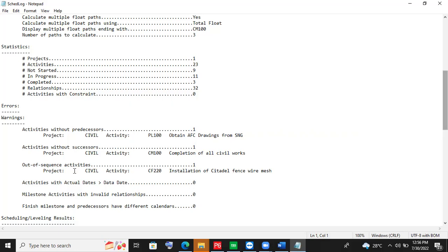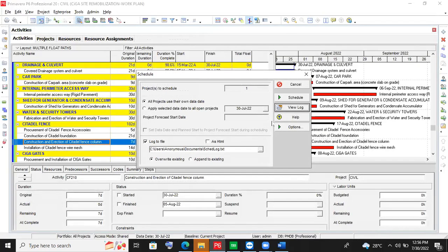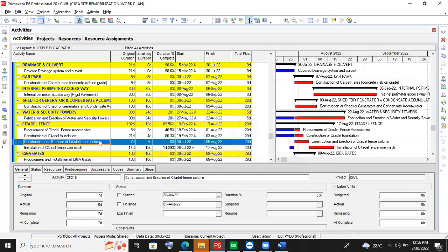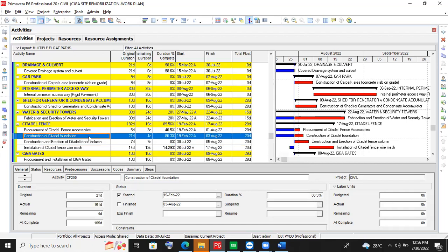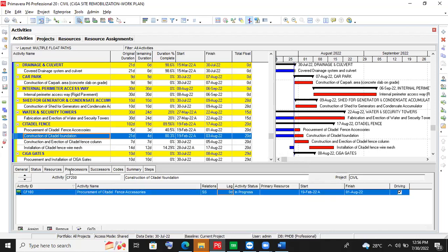So in any case, in a situation whereby we have an out-of-sequence activity, what you need to do is — after you have checked the log and seen that particular activity involved — you just change the logic. You go and change the logic. Since this has started, I'm supposed to start after the finish of this one. This particular activity — you will link it from that activity that is no more the successor of this activity, and link it to another activity.